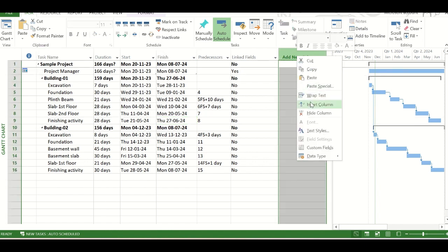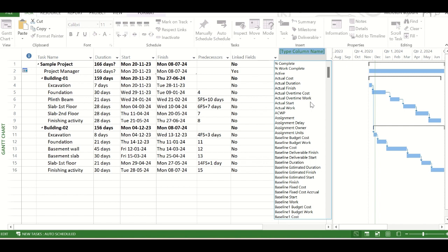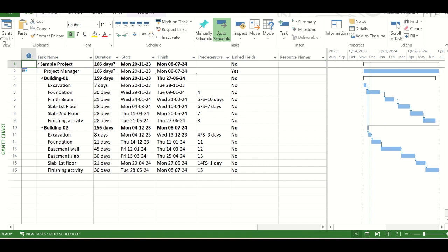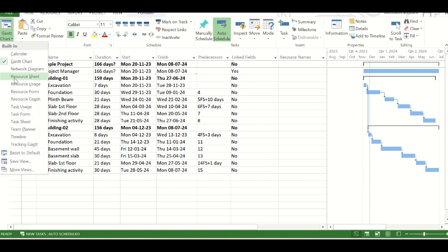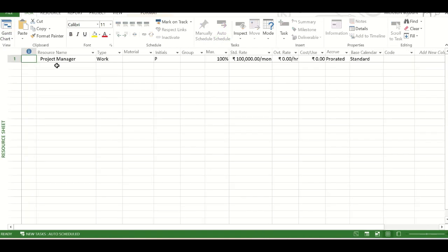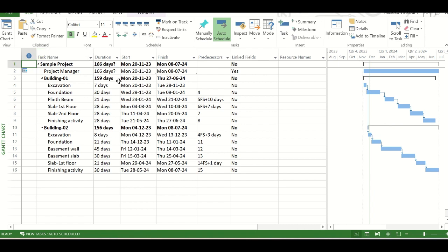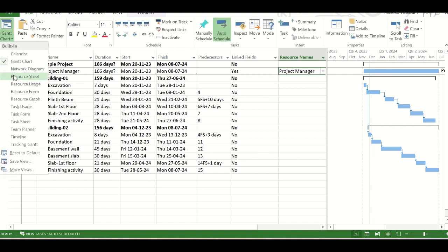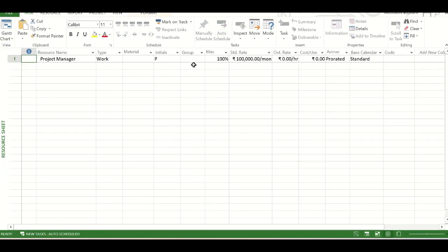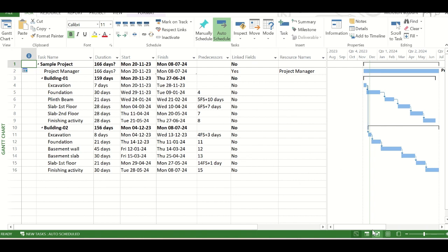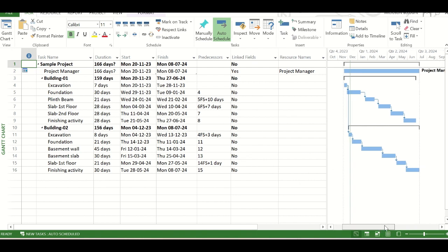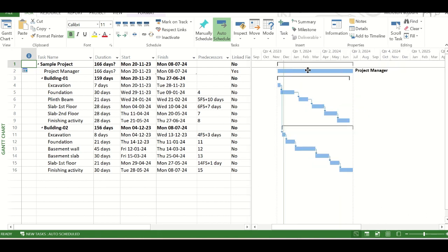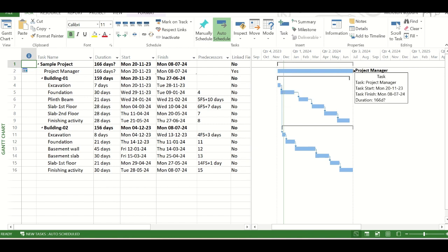So if we want to assign the resources, then right-click on it, and then go to insert column and type resource names. So resource name option is here. So in the resource sheet, I have already created a resource called the project manager to show you the example. And now we will go back to the schedule and here we will click on the resource name and select the project manager. So project manager in the resource sheet, you can see that it is a work type resource and the standard rate we have kept here 1 lakh per month. So now you can see that this project manager resource has been assigned on the project manager task. The duration is from the start date to the end date of the project.